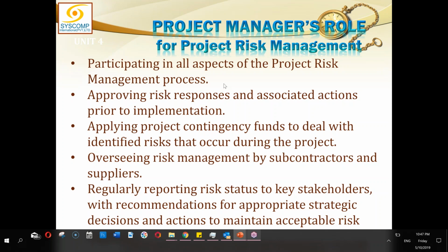When we are identifying the project risk, you should gather as many concerned people, as many stakeholders as possible. Or if it is not possible to get them all in one place, then you should have focus groups, and you should be doing seminars or sessions for risk management with different audiences. Approving risk responses and associated actions prior to implementation.